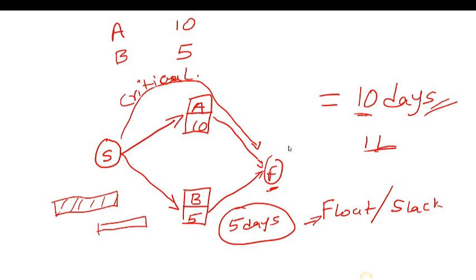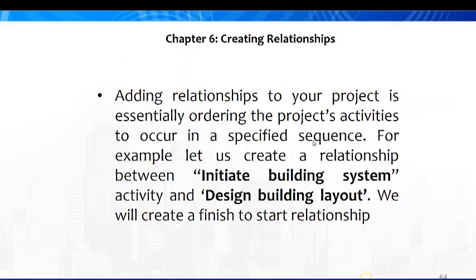So if we take a look at those activities that are not on the critical path, you notice that all of them will have float. The float there tells you how long those activities can be delayed. But the activities on the critical path, if you check the float, you're going to see that all of them will have 0 float. Because, like I said, you cannot delay an activity on the critical path, and if you delay it, it will of course affect when the project would finish.